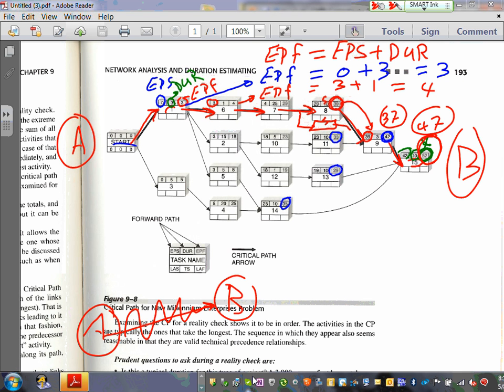When you analyze it, ladies and gentlemen, you have to put it in a network like this, by dividing each goal into objectives, into tasks, into activities. Activities are assigned a dollar value, a duration, and resources. Then you put it in a network like this, and the path that decides the duration of the project, or where the majority of the dollars is spent in the project, will get your full attention, Derek.